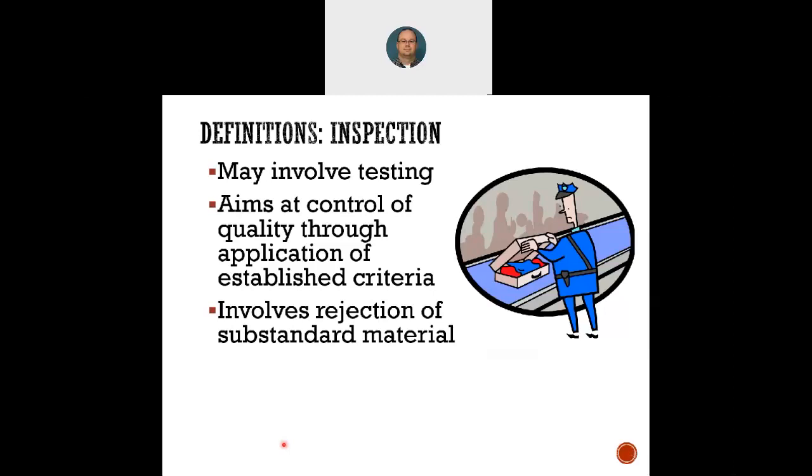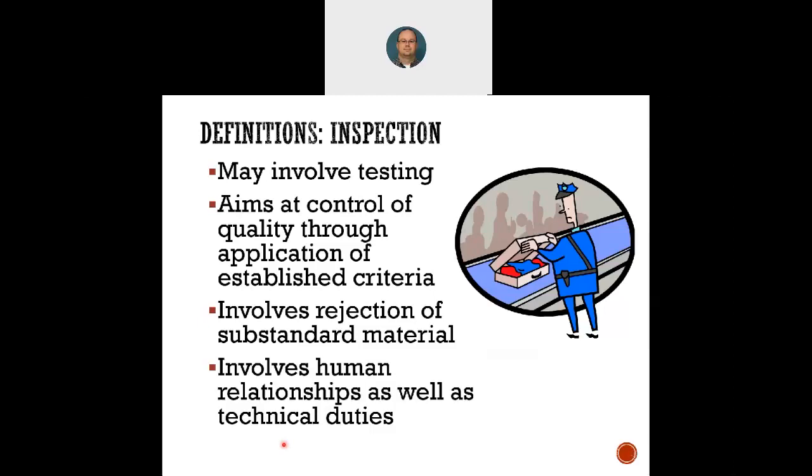Okay, it involves rejection of substandard material. So if the concrete truck comes in and it's out of spec, there's obviously a reporting issue there. We have to report it. We have to tell people, and it may be rejected. And it involves human relationships as well as technical duties.